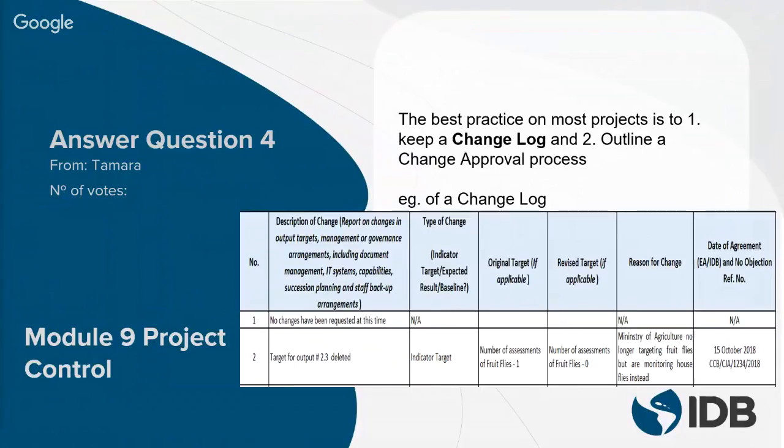We've found that has been very, very useful. The projects now have been able to outline all the aspects of their projects that have changed. And once they've started to make a log of it, at the end when they're reporting, it's so very easy to report to us what those changes are. We've included an example of what the change log would look like. There are different types of changes, so you'd have to explain what the change is, the type of change that it is, what was your activity, and the reason.